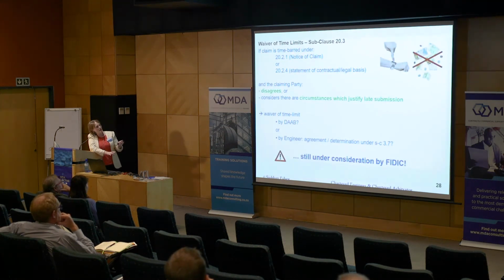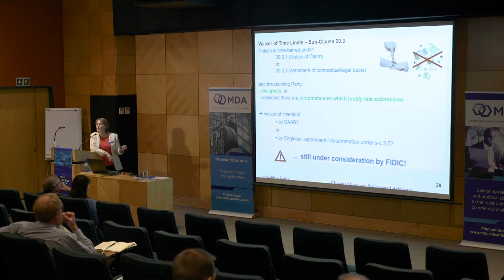Now, waiver of time limits. Because time bar is such a wonderful source of disputes and disagreements between the parties, and will probably continue to be so, we believe in this idea that in certain circumstances the time bar can be waived. Yeah, and that's a good idea, and it's a good idea to have that happening at the time that the claim is made, rather than at the end of the day when everybody's positions have become so entrenched, and the contractor, while he would have been entitled to a significant payment, cash flow being king, if you like, hasn't received it because a certain piece of paper wasn't submitted on the right date.